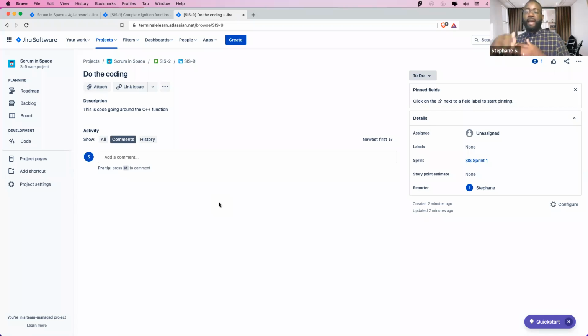Okay. So in the hierarchy, you would have epics, and at the same level, horizontally, you could have stories, bugs, and tasks. And then at the bottom, you could have subtasks. Right? Okay. So the subtask is the child issue. No, there's no more child issue after the subtask. The subtask is the lowest. The lowest, okay. All right.